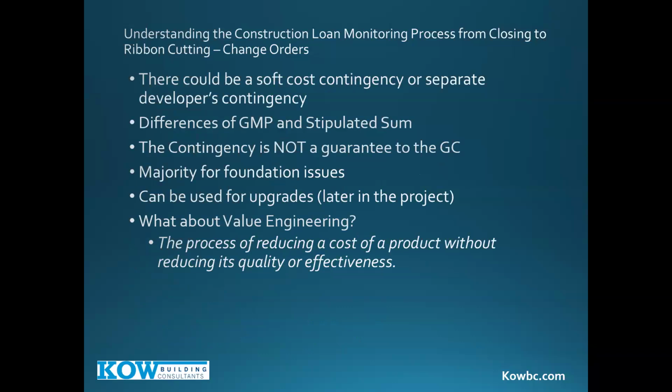We like that because if you can prove the subcontractor has based their numbers on a certain material price, and you can prove later that it went up to another material price, it's an easy paper trail to justify that change order or not, meaning they're not going to be able to get it if it was not an actual increase. So we have seen some projects come in with a general contractor's contingency and a tariff contingency.